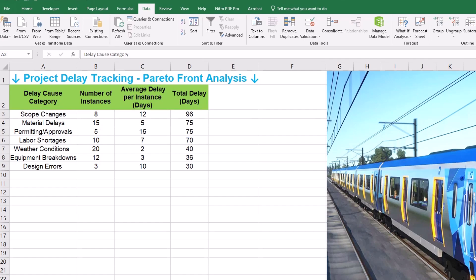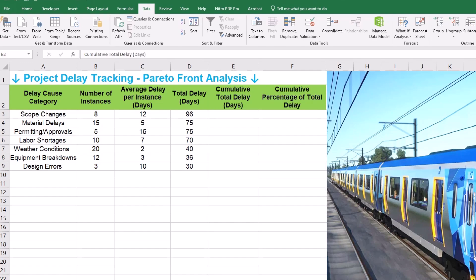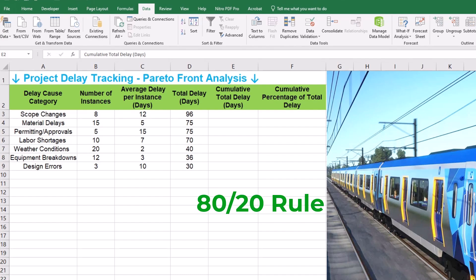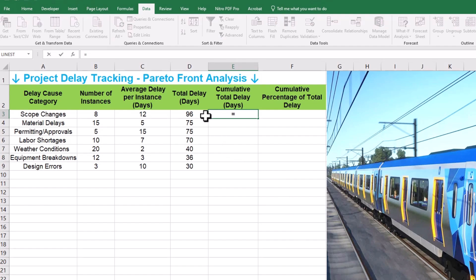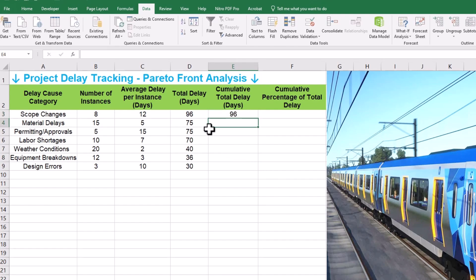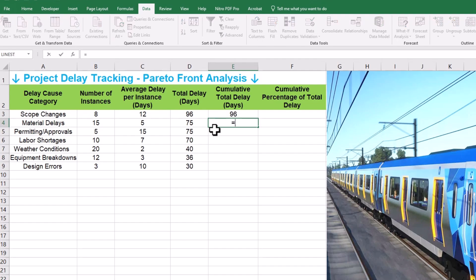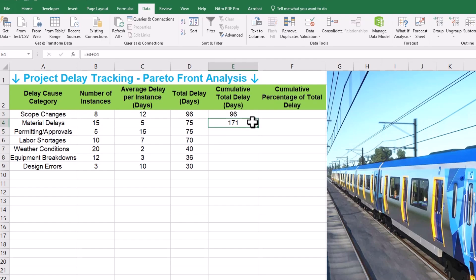But we are not stopping there. To truly understand the cumulative impact, we are going to calculate two more columns: cumulative total delay in days and cumulative percentage of total delay. These will help us visualize the 80/20 rule, which I will explain later. In column E, we start with the first value being the same as the first total delay value — cell E3 will be equal to D3. Then for cell E4 and onwards, we add the current row's total delay to the previous row's cumulative total. The formula in E4 will be E3 plus D4, and you just drag the formula down.